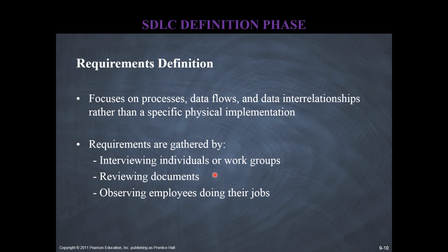In fact, I think it's better to start with this, because sometimes if you just face a group of users or individual users and you start saying, well, what do you need? I mean, it may take a lot of time for them to pick up the speed and start analyzing the situation. I think it's much better to present them with a list of requirements that you already have. So it will be a much better starting point for them, and they will say, oh, you forgot this, you need to add this requirement, or you need to remove this, or you need to explain this. So it will be just much faster that way.